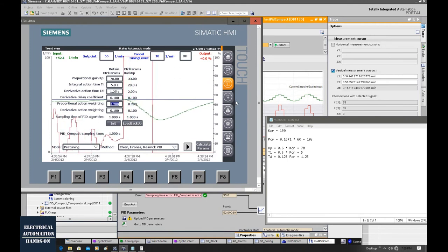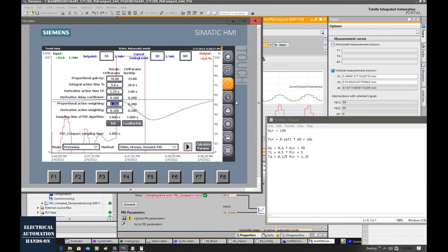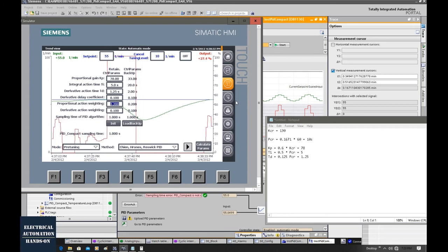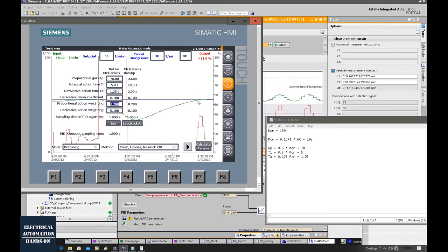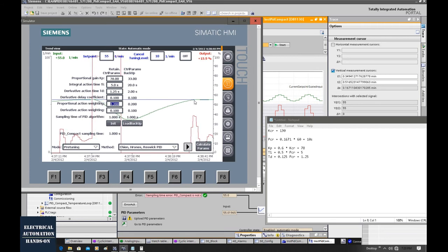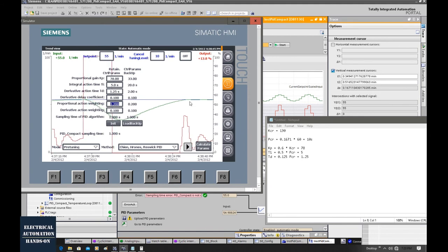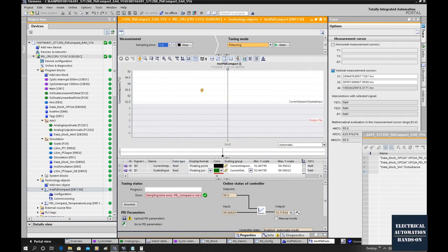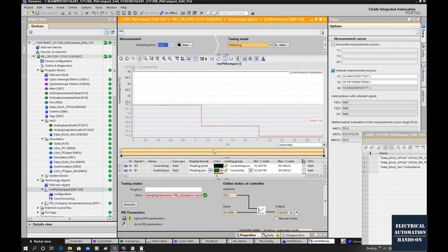Now the system — this PID control loop — is controlled by these three parameters by the automatic PID controller. We can see this process value is reaching the setpoint. It looks very nice based on these parameters. Keep in mind, with the calculation based on the Ziegler-Nichols second method, the system would have a little bit of overshoot to guarantee the settling time could be shorter. If your system is sensitive to overshoot, you can go further and fine tune the PID parameters.